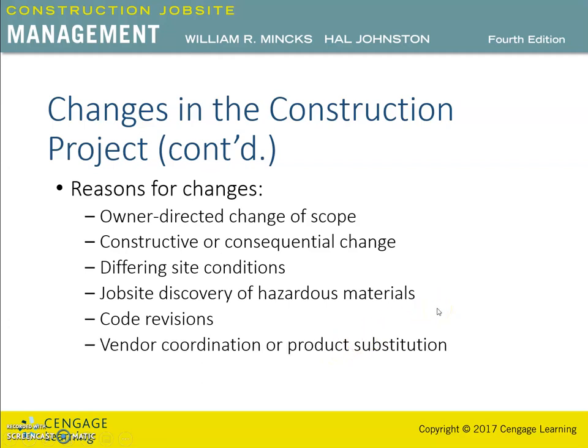Vendor coordination. This is also a reason for changes. Additional problems can occur near the end of the project when the contractor is requested to coordinate with vendors that supply and install outside equipment. Often initial drawing and submittal coordination are not adequate to finalize the installation and operation of the equipment.